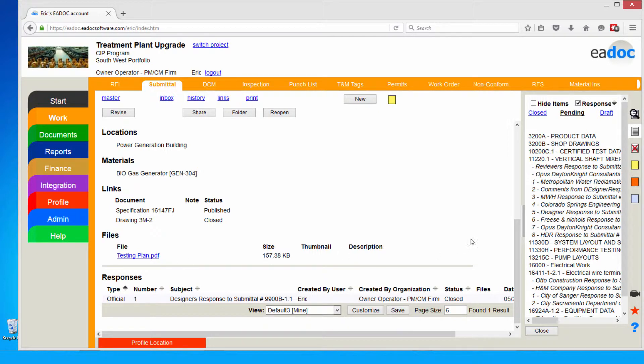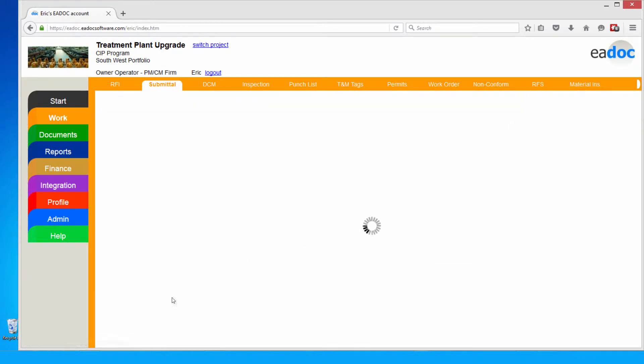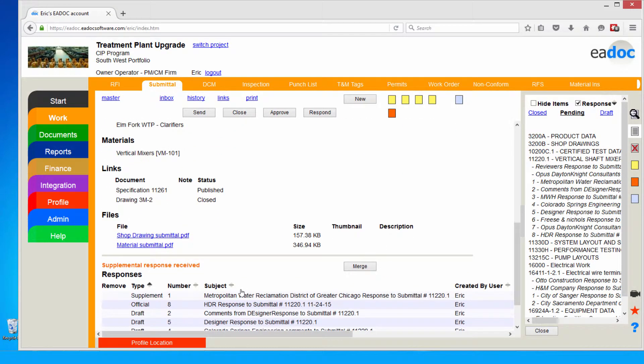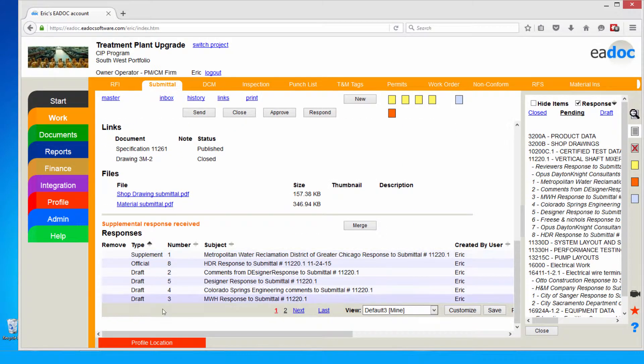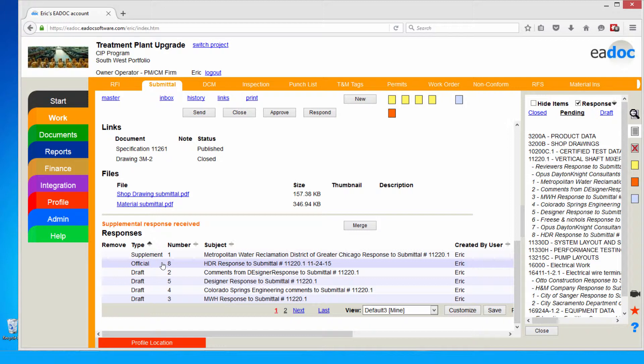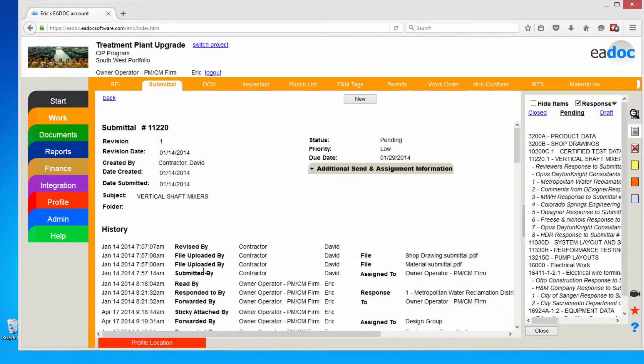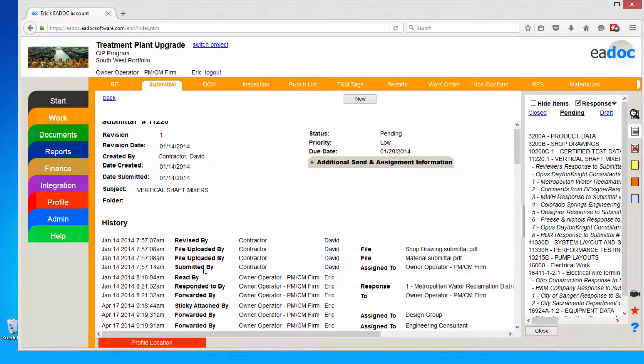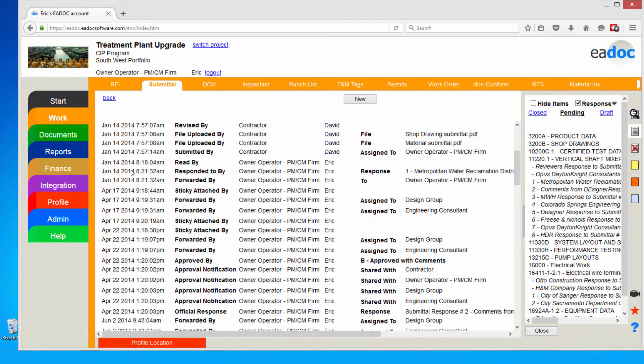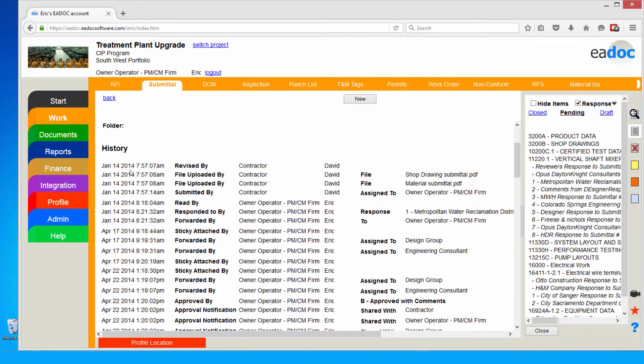The other unique innovation that we deliver is the ability to review and route these around to multiple reviewers. If I bring up this other submittal, for example, I can see all the different comments here on the bottom. I can go out to multiple reviewers, get multiple comments coming back in from those reviewers, and then I can select the official one. Whoever is responsible for coordinating the submittal comments can identify and merge those comments together and then share the official response back with the contractor. This way the contractor only sees the official submittal comments that goes back to the client on the project or back to themselves.